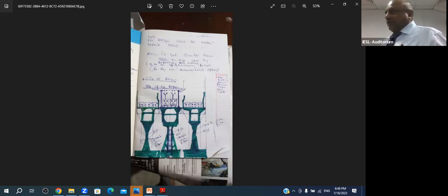So if you look at the cost difference, completing 1 meter cube of 40 megapascal concrete can be 40,000 rupees, and completing 1 meter cube of 60 megapascal concrete can be 43,000 to 44,000 rupees. So you can see it's a minor difference, but you are increasing the strength by 50%. The extra cost is 5%. So that's how you have to look at the equation. The moment you look at it in that context, you can see there's huge room for cost effectiveness with Eurocodes.